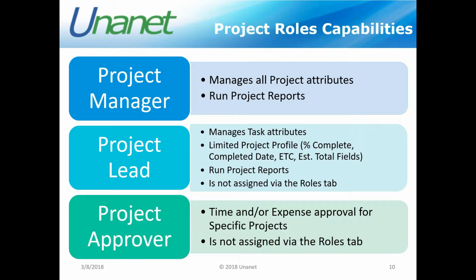project profile. They may need some additional capabilities, because remember I said there are some other roles that we use in conjunction with roles that give us a little extra ability to see things. But basically the project manager is able to go in and set up a new project if they have the right org access. They could create a new project, they could create tasks on that project, they could enter a lot of information like funding values, and they can set up a lot of the different pieces on the project.